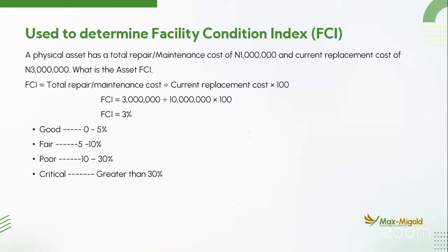Don't forget, changing the roof means you have to remove the roof. You have to do another wooden framework. You have to put a fresh and new roof. Then the building has suffered what we call structural differential, which is a result of foundational error. This is coming at a huge amount of money.